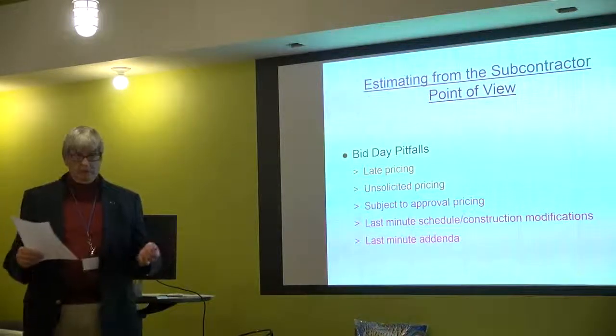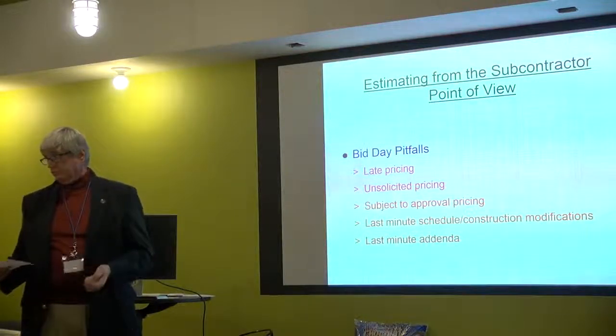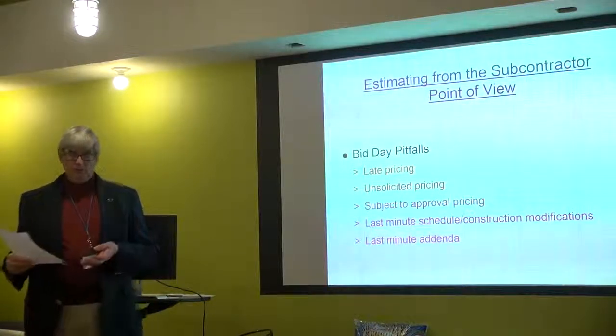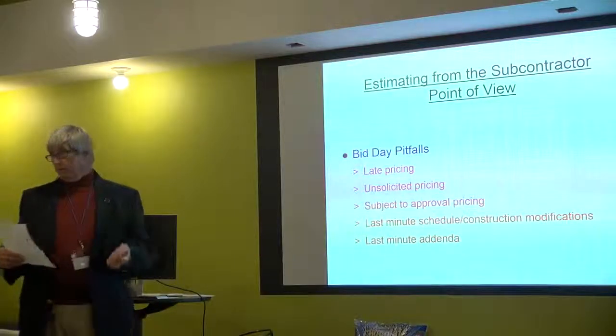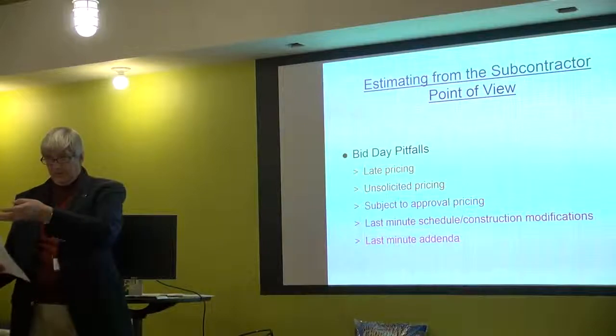Operations, general contractors that you're working with, and as a subcontractor, you're probably working with multiple contractors. There may be schedule changes. The general decides that he wants to do this instead of that, as he originally thought. It may have a direct impact on what your cost is going to be and how your project is phased and/or scheduled.